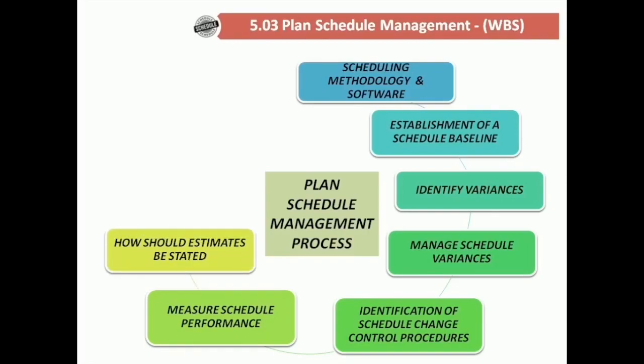How should estimates be stated? After activities are determined and resources are assigned, effort estimation takes place, and in order to ensure coherent estimation and reporting, units for estimation must be documented in the plan. Variance thresholds. Schedule performance index shows whether a project is behind schedule or ahead of schedule, and variance threshold defines when these should be corrected or an action should be taken.